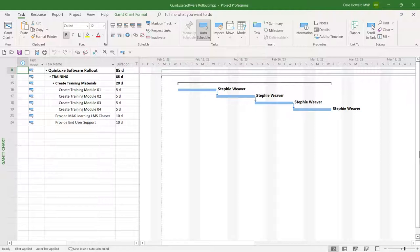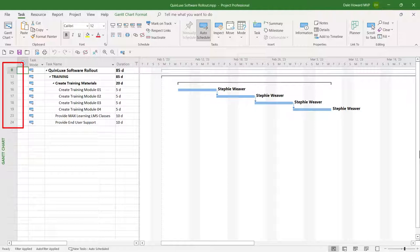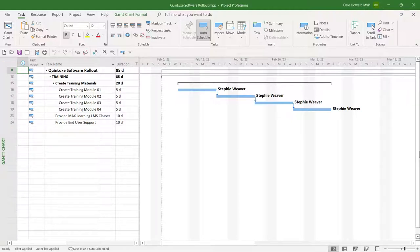There's something terribly wrong with this project — it's a mess. There's a bunch of tasks missing. I don't know where they went or how to bring them back. If you ever run into a scenario like this, where you have missing task ID numbers and you don't know where they went, you've probably got a filter of some kind applied to the project.